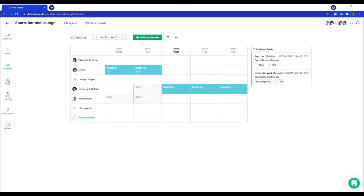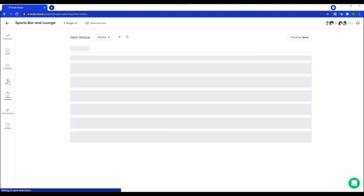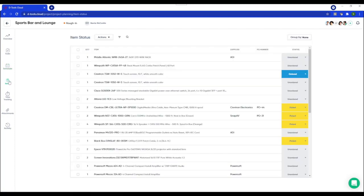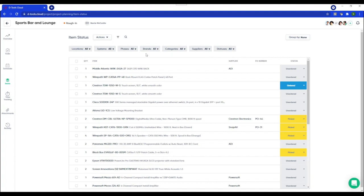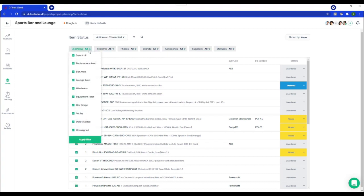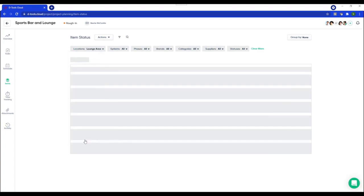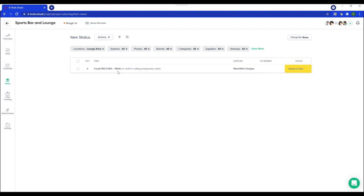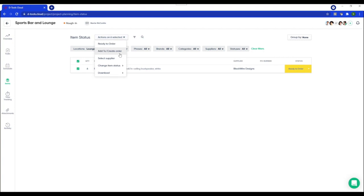Alright. So onto items. This is a very powerful view because you can see all the equipment in this project and you have those same filtering options available here as well. So I will go ahead and filter. Let's just say we'll filter down to check out what's in the lounge. And these speakers are unordered. However, from here, I can create a purchase order. So staying organized in regards to your equipment just got a whole lot easier.